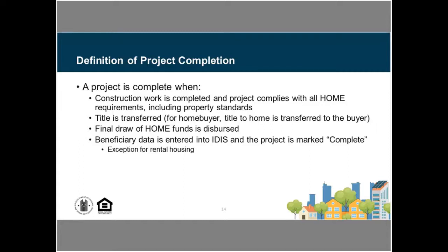So for a project to be considered complete, all of the construction work has to have been completed. And that would mean that the project has been inspected. It meets all of the required property standards. We also need to have the title transferred when we're talking about a home buyer activity.